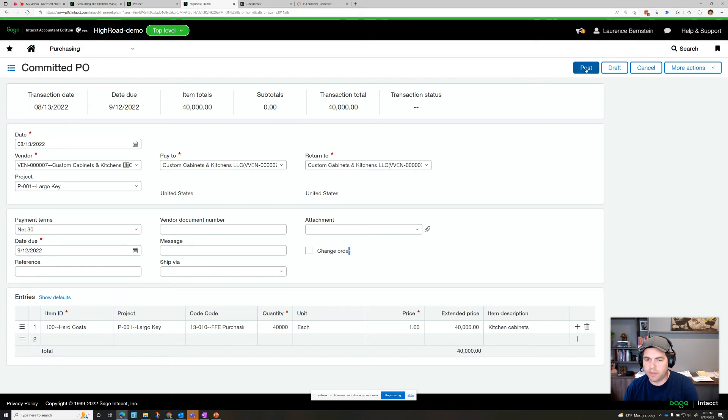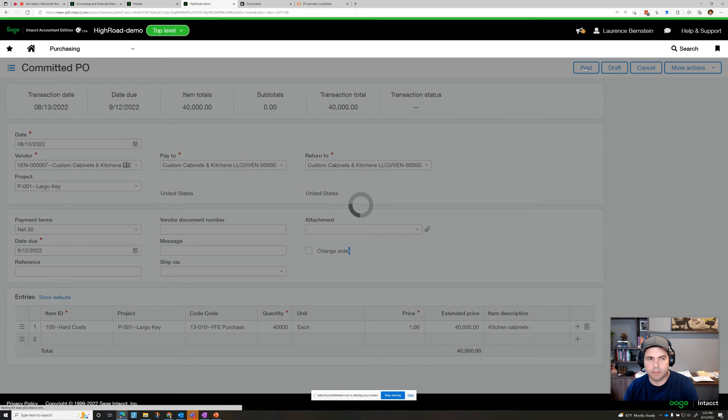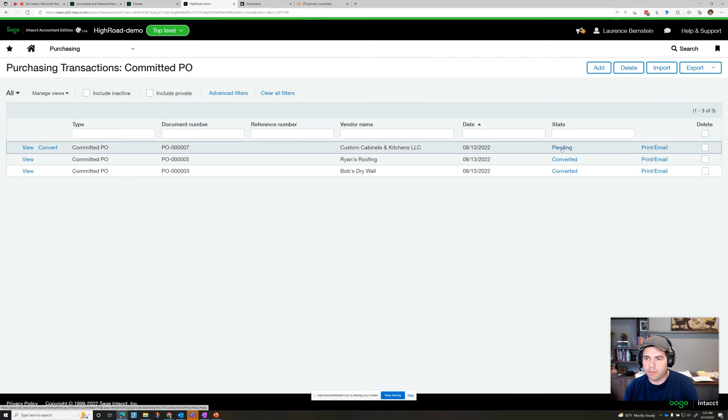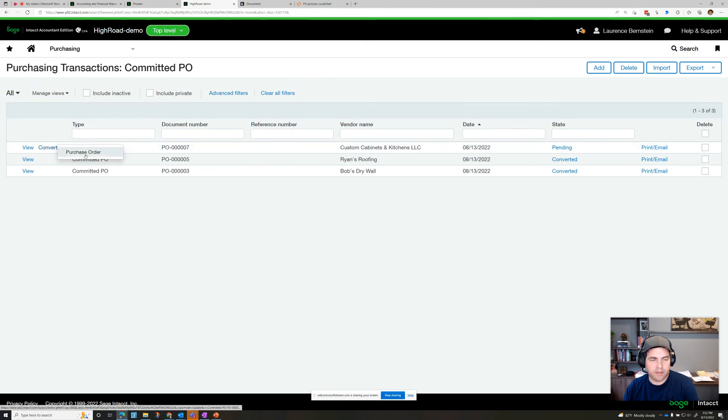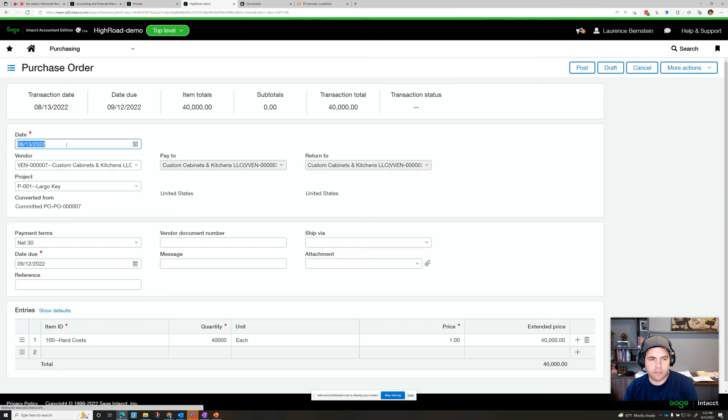So let's go ahead and post. This committed PO here for custom cabinets and kitchens can now convert to a purchase order. And we go ahead and post it.